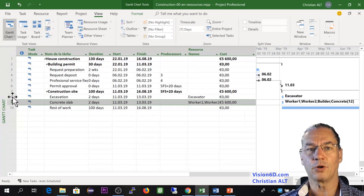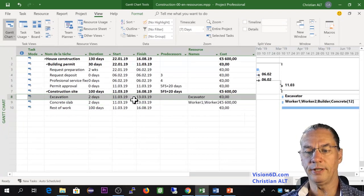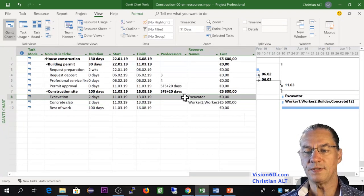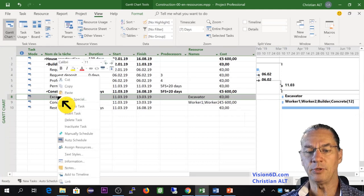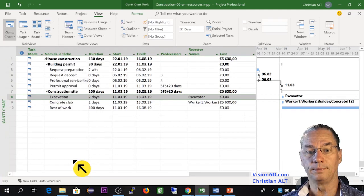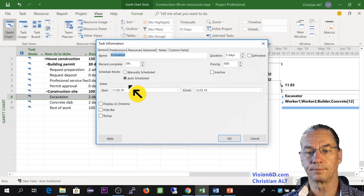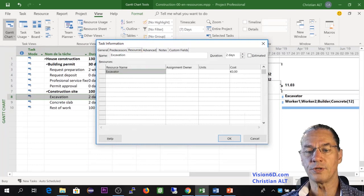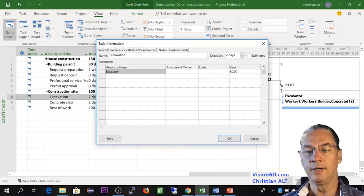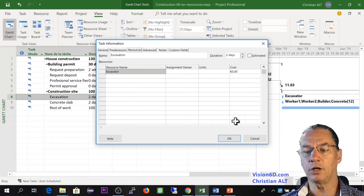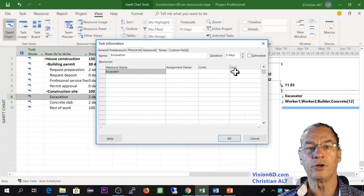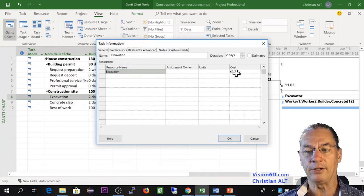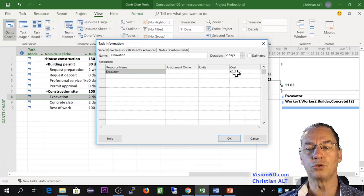For the excavation part, we see here the excavator, and I'm going into the information as well. Into resources, we see excavator, and you have here a column which is cost. We are going to put directly the cost of the excavator for the two days.